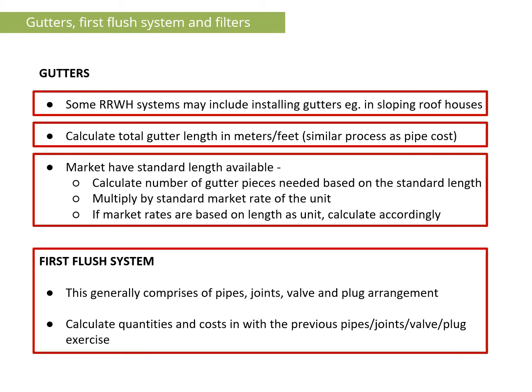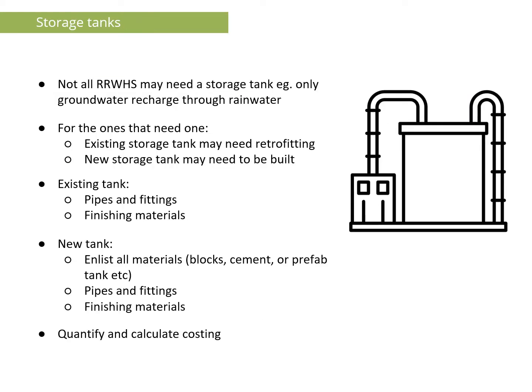Apply the same procedure to calculate the other components of the RRWH system. For components like storage tanks, there are important key points that you have to keep in mind. Say not all RRWH systems need a storage tank. Sometimes it needs a recharge structure as well. In case of storage tank, there are two possibilities. Either it requires retrofitting in an existing storage tank or it requires building a new tank.